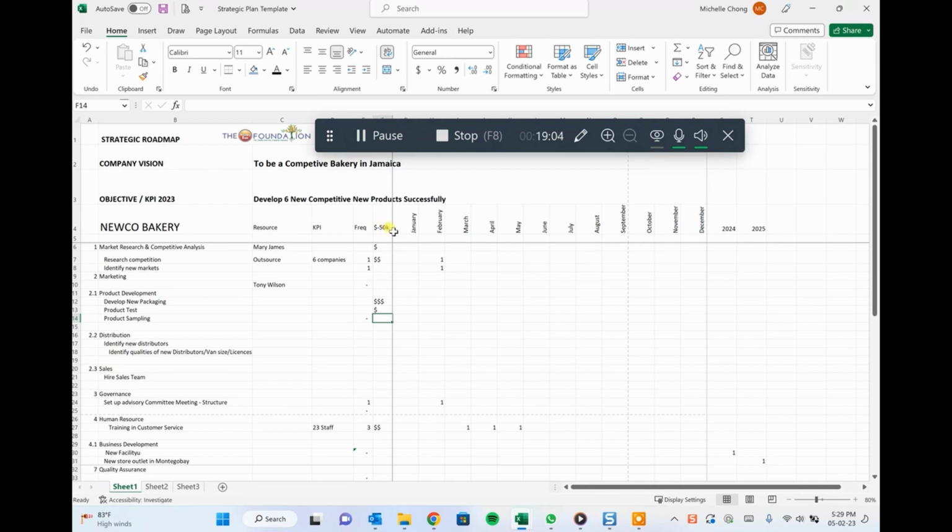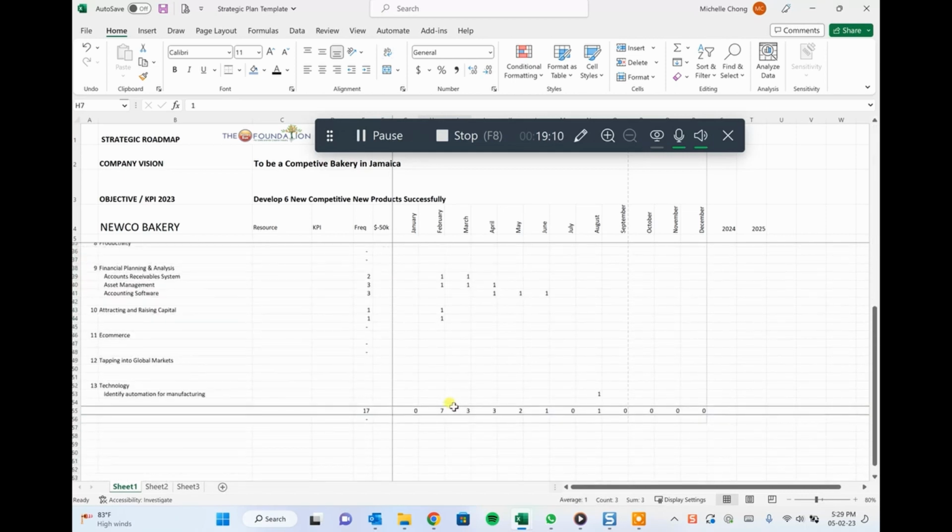Five is to balance your workload. So this is telling you what your workload is. It's saying that in January you have a lot, and just put in some random things. And it's saying that in May you have a lot. So you may want to move some of your things into months when you have a lighter workload. So balance your work, you're going to have to look at what the tasks are, whether you can move them later or earlier.